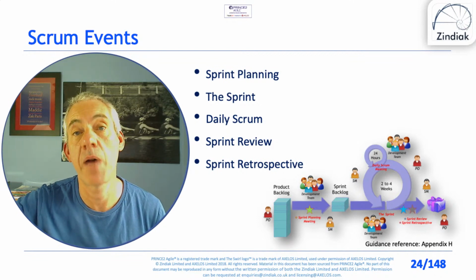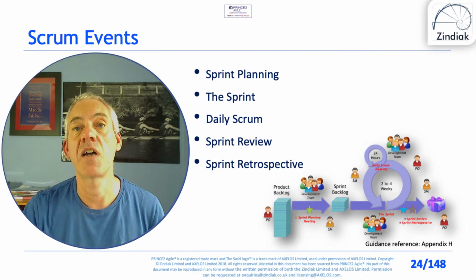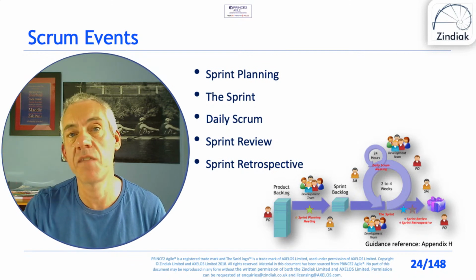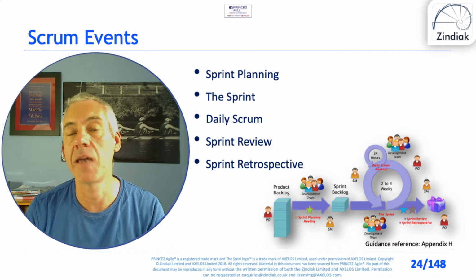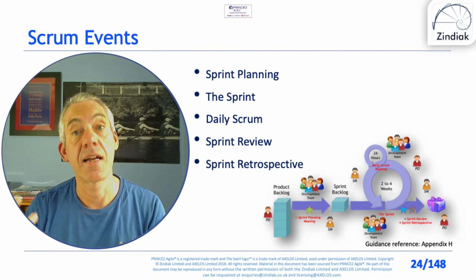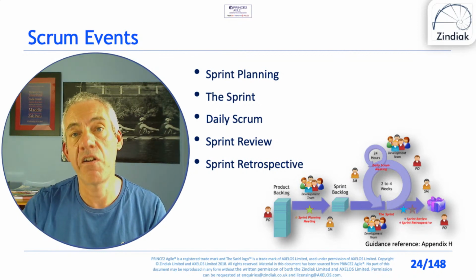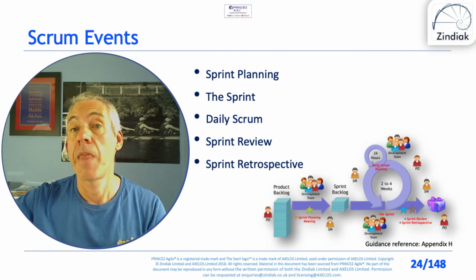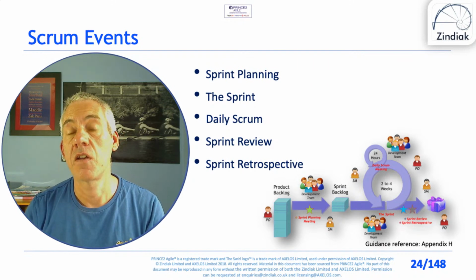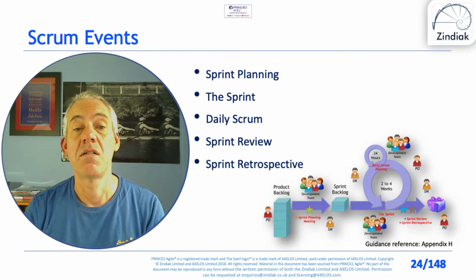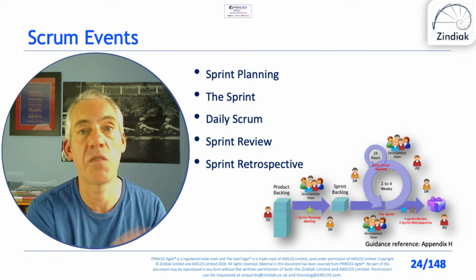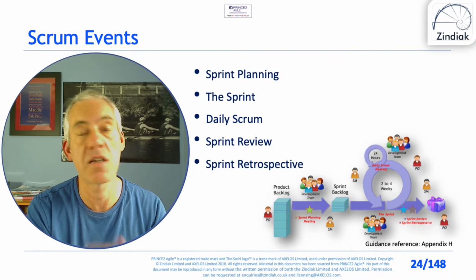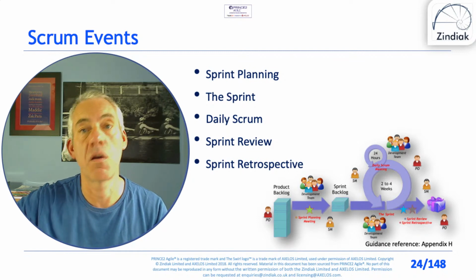When we get to the end of the sprint, if we have achieved our sprint goal, if we can accept payments, we've achieved our sprint goal. We may not have delivered every single backlog item. We may not be able to accept every type of payment, but we can accept payments. And that's a very good example of where, in the following sprint, the customer may well say, don't bother with the payment types you haven't delivered. We can live without those. We can accept payment. That's good enough. Crack on with something else.